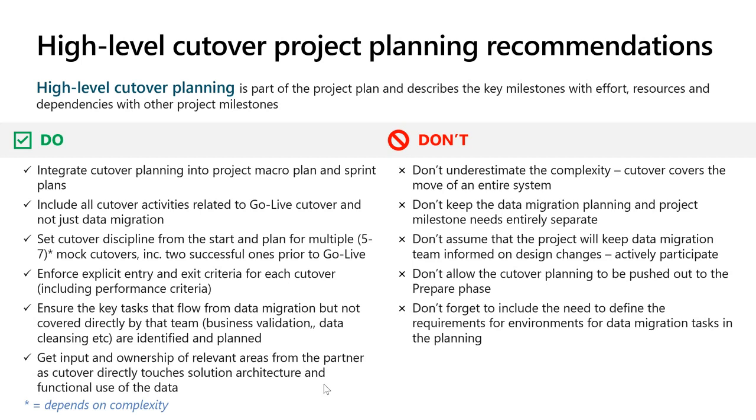And make sure that each time you're exercising them in the way that reflects what you're going to actually do when you go to production, right? It's no good having a shortcut where you're practicing something just to get data from A to B for a test cycle, because you're not practicing what you're going to do for production use, right? That can be misleading. It can also reduce the effectiveness or the meaningfulness of that test cycle because you've done something special. You're not going to repeat when you do your production go live.